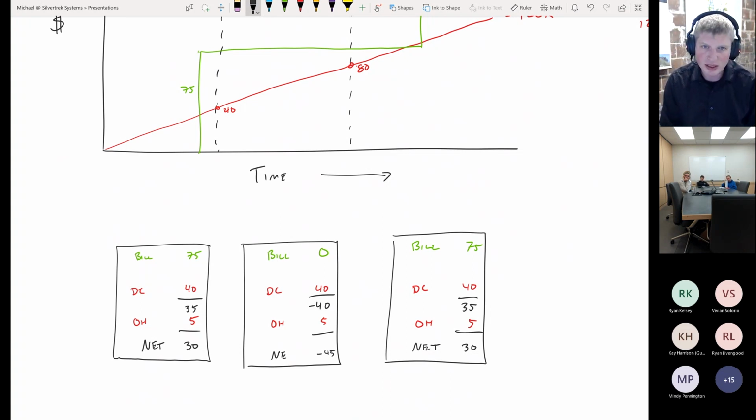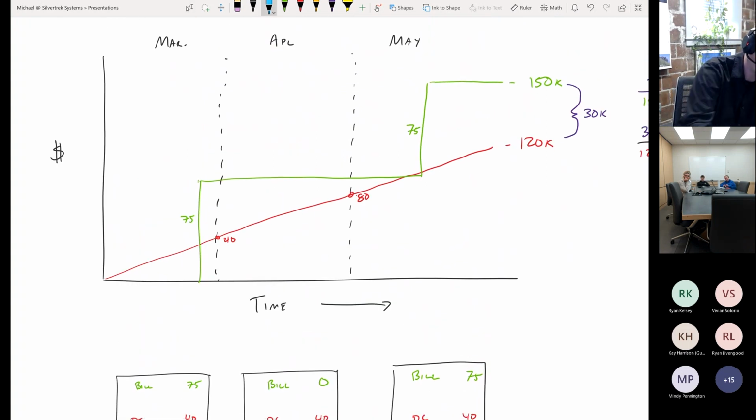So we need to do something called adjust this for our over or under billings. How do we do that? Well, we mentioned up top that we're going to match this to our earned revenue. Earned revenue is when we follow the cost curve, but we make it end up at the top of the revenue line. So we would draw a fake line here that starts at the bottom and follows the cost curve. So it has the same slope-ish as the cost curve here, but ends up at $150,000. This is our earned revenue line.